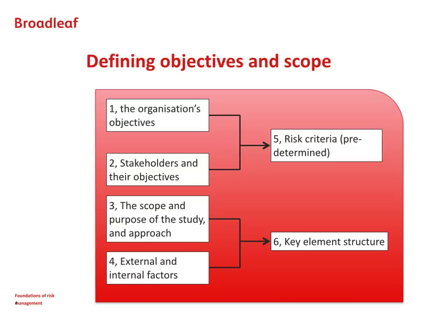The scope and purposes of the study and the external and internal factors, those risk sources, help us define a structure which we normally call the key element structure, which then allows us to be comprehensive and coherent in the way that we discover and understand risk.